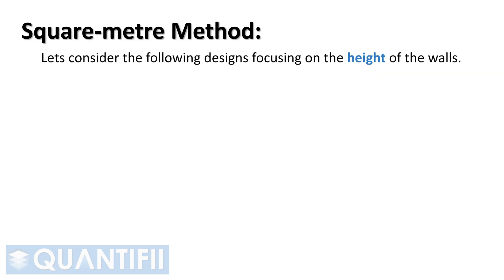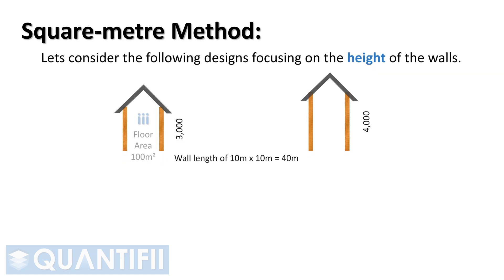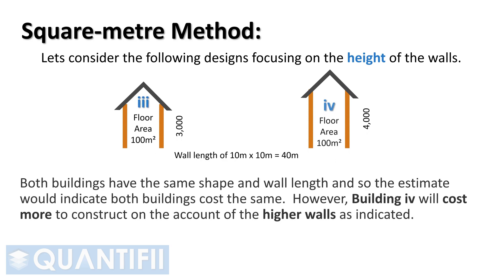Moving on to the following designs focusing on the height of the walls. Both buildings have the same shape and wall length, and so the estimate would indicate both buildings cost the same. However, building four will cost more to construct on account of the higher walls as indicated.